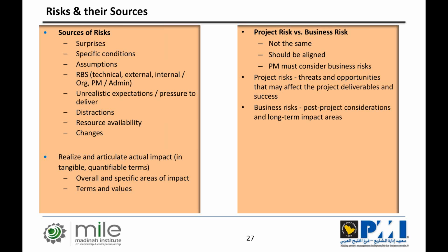And the expiry date of the assumption is when the assumption turns from an assumption that is a condition into a risk. Trust me, and trust many people that I have taught throughout the years, I love assumptions, not because I love assumptions, but because I utilize them for the better interest of the project, right? And then if the assumption behaves the way I want, all good. If the assumption is not behaving the way I want, I treat it as a risk.